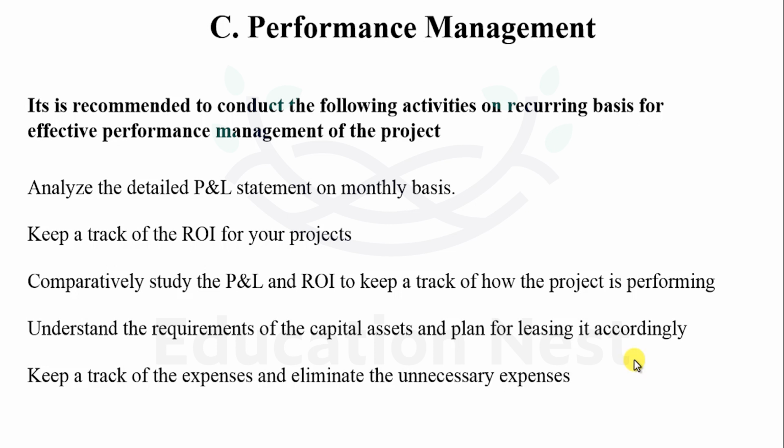And again, I'll re-emphasize the fact that even small changes in the cost can cause a drastic change in your return on investment. If you have any doubt, see the entire slide on our ROI computation, how we worked on the Excel with different numbers, with different permutation combinations. And just by changing $20,000 of a cost in a project of $500,000, the project preferential order changed from number 3 to number 1. The percentage return on investment changed from 25 to 32, I believe so.